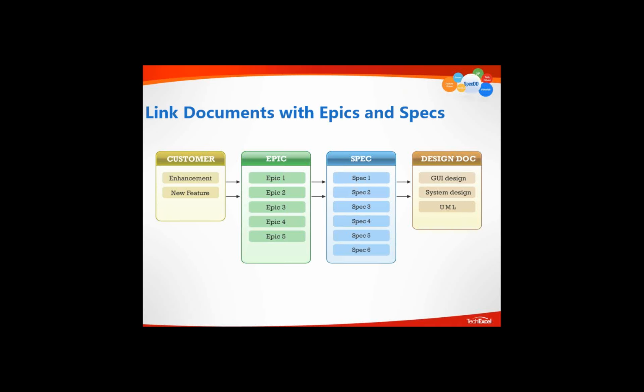It's small enough: it's going to take less than 5 days. And it has meaningful value to an end user. A potential customer looks at this set of requirements and smiles, meaning, oh yeah, if the vendor is delivering this kind of enhancement or this kind of new feature or this kind of bug fixing, we're happy.